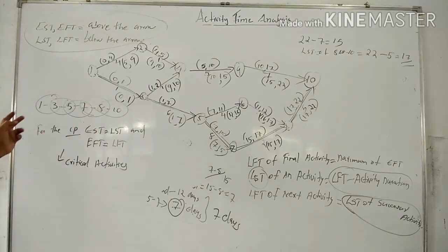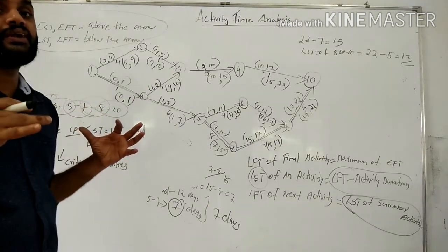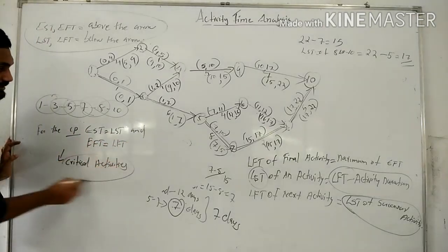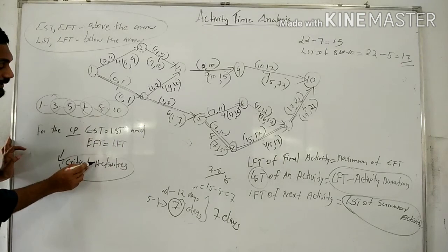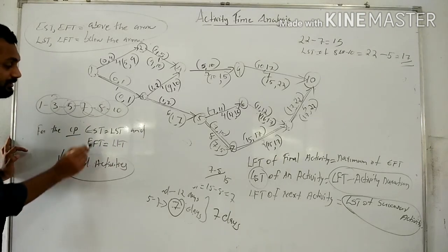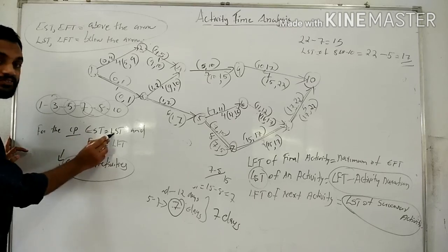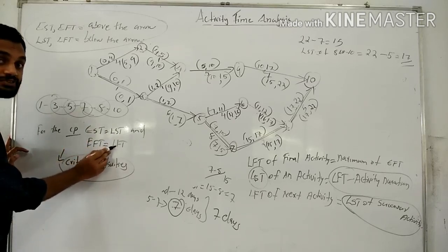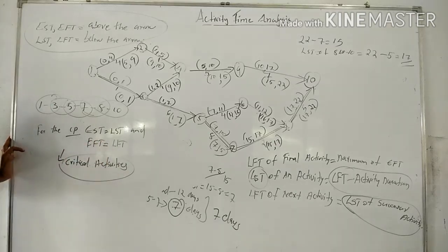For critical activities, we can conclude that EST and LST should be the same, and also EFT and LFT should be the same. Okay.